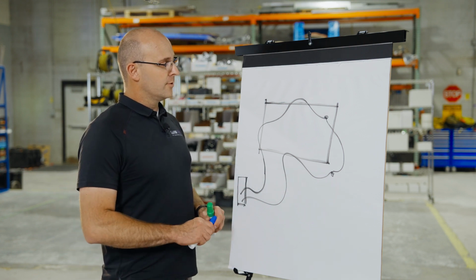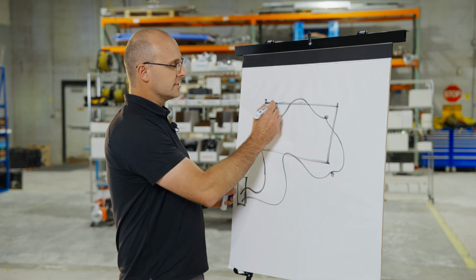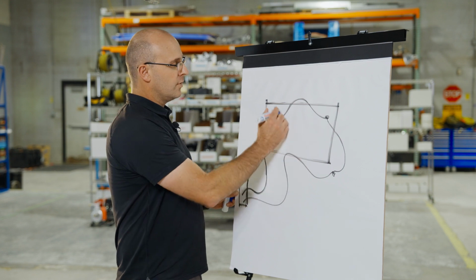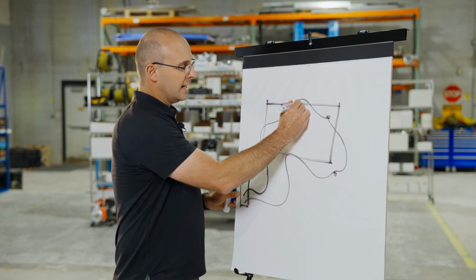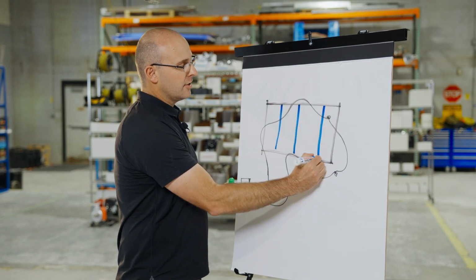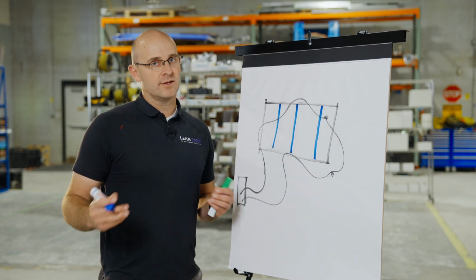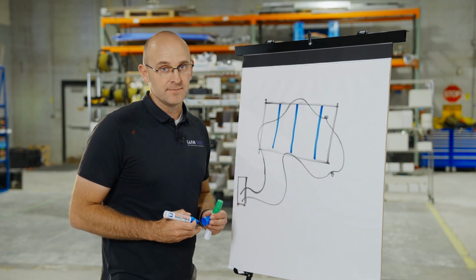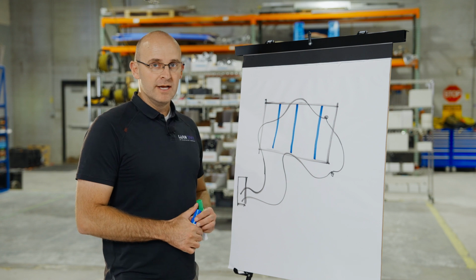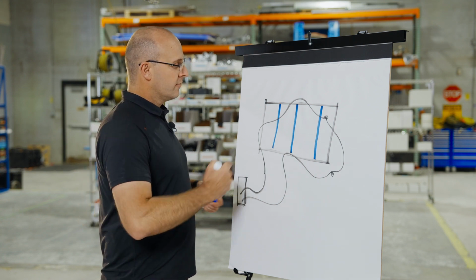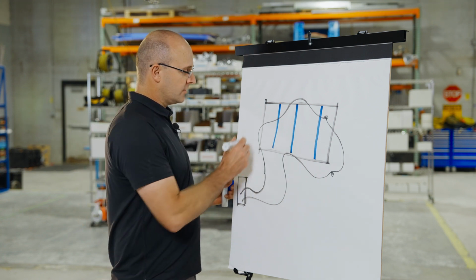So first and foremost, if you're using the takt production system on a project, you don't have one overall floor, you will have zones. And they might not all be the same size, it's fine, they're leveled, they're the right size. What we care about is that trades are going from zone to zone, so let's just take one trade.